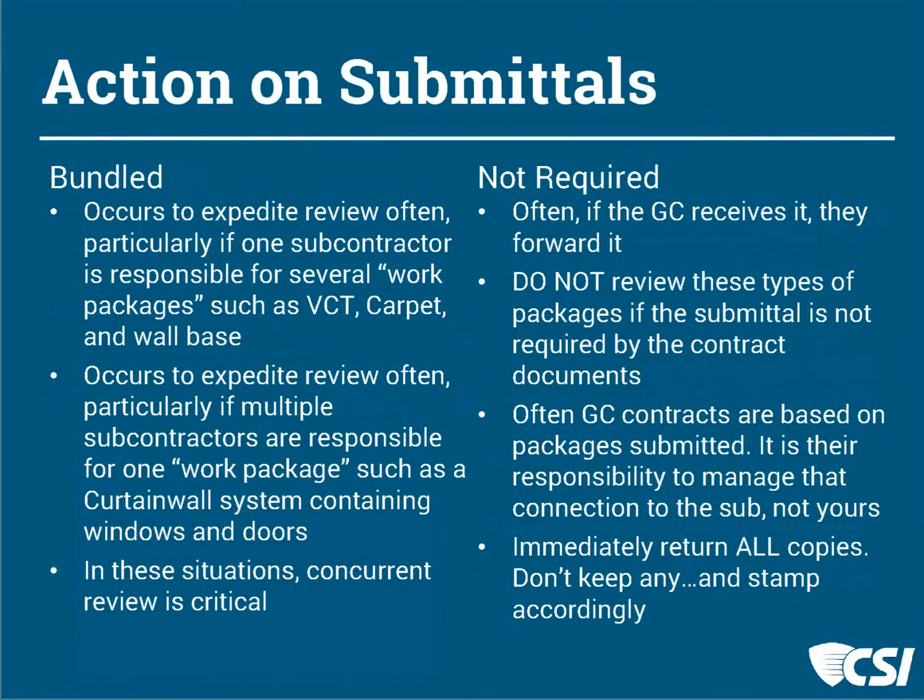But as we touched on earlier, there are submittals that are bundled, and these are occurrences where it's to the benefit of the project and to the project components to be looked at one time. And I try to spell this out in my supplementary general conditions.